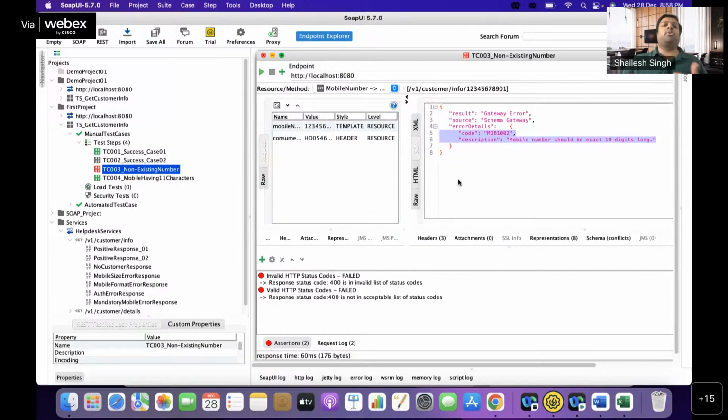Stakeholders may ask you more questions. So if you have those answers, you can answer those. If you don't have any answer, you can say, I think our lead developer can answer it better, and you can call his name and ask him to clarify further. That is how you do a demo to the stakeholders. And if they feel that something else is missing in the implementation, they will give you a demo review. Based on the demo review, if anything needs to be enhanced, it will be taken again in the next sprint.